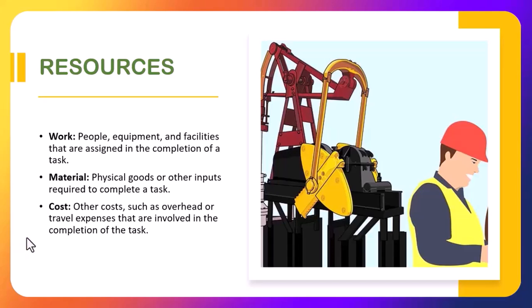Then you have cost. Other costs, such as overhead or travel expenses, are involved in the completion of the task. You do not enter the cost value in your resource sheet. You enter the cost value of a resource only when you assign it to a task.